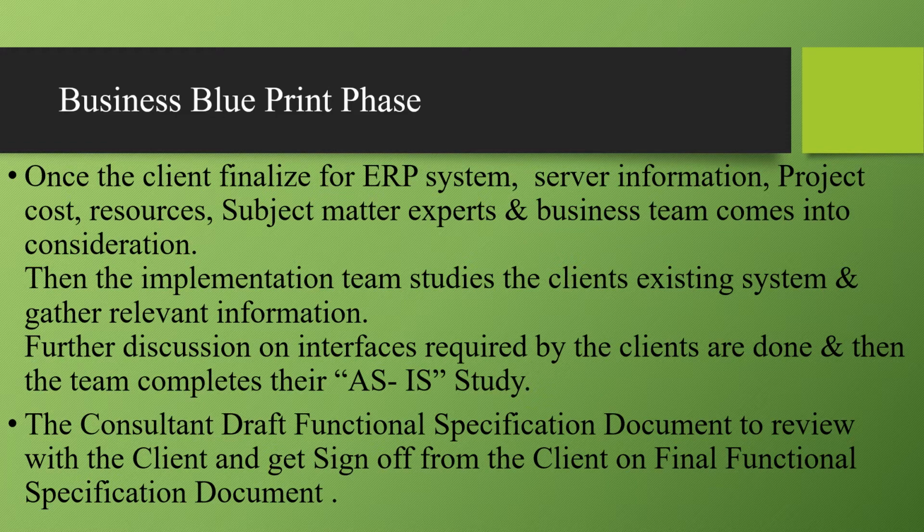Once the implementation team prepares the draft documentation, they send it to the client team's lead person, who will review the documents. If there are corrections, the client team sends them back to the SAP implementation team through the functional leads. Each functional lead modifies the document as per the review comments and sends it to the client team again. The client team reviews again, and if it fits their requirements and the discussion, they provide a sign off. That sign off is known as the business blueprint phase.